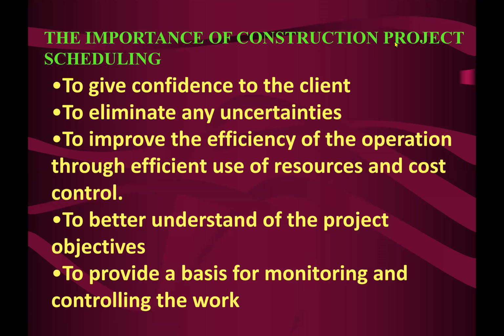General scheduling everybody can do, meaning just putting the activities according to the names of the big activities. That is easy. But when we go into the detailing, the contractor should know the best. The one who is going to construct the project should be doing the scheduling. So we are referring to those people.